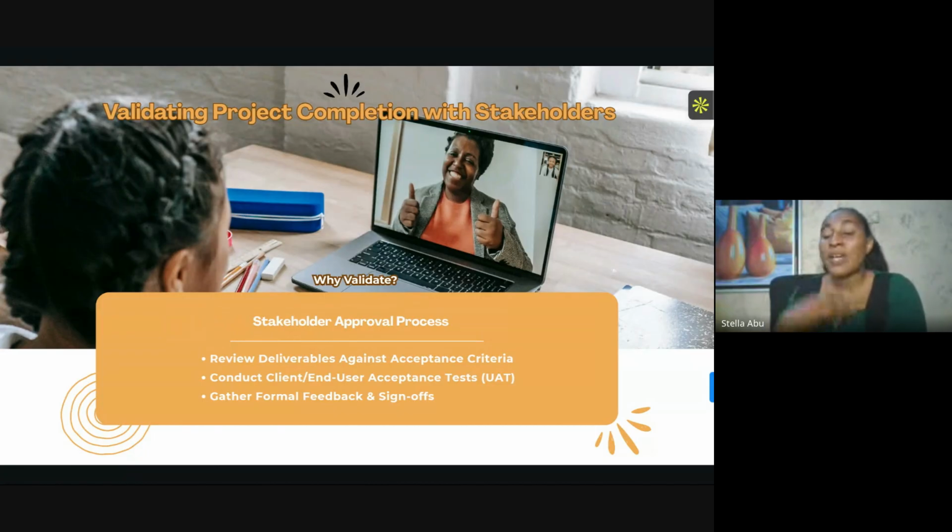Now, when I am evaluating as you are closing the project and handing over everything you've done, if I found out at that point that Timileyin did not get farmers, Timileyin went to get teachers because she was not able to meet farmers. Now, the first part of it is I'll look at the criteria, which is part of your scope, to say what are the criteria for this project. And when I look at it, the first criteria is get farmers, and you did not get farmers, right? You got teachers. That's one problem, right?